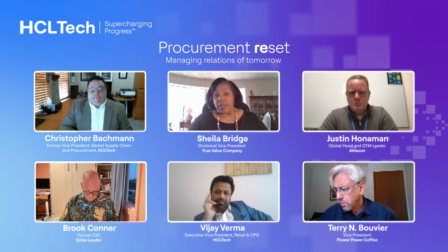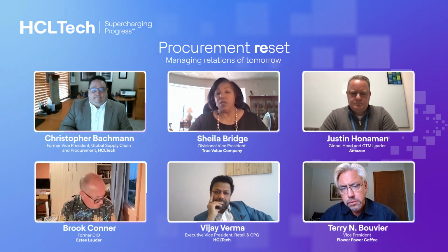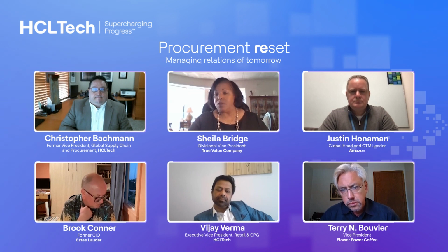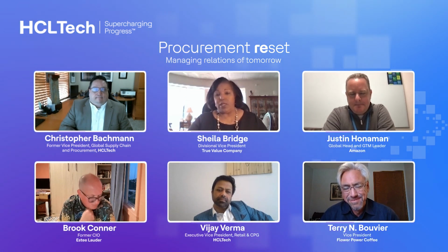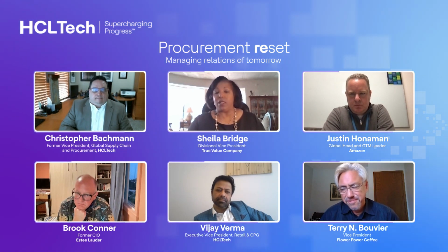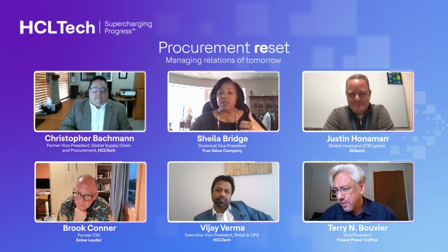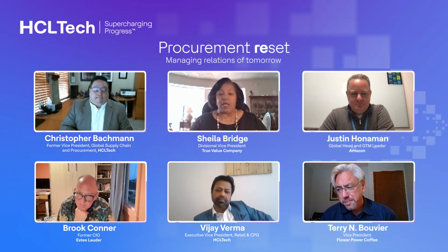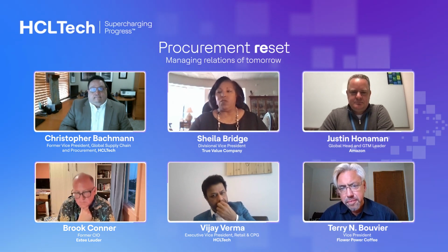So, for example, if a project is supposed to start in Q2 and you have to buy hardware, before you could just plan in Q1, tell the vendor you need the hardware, and it would show up just as you're ready to do the project, right? So you have to start planning this last Q3. You need that long lead time now to order what you need. And you can't order without engineering.